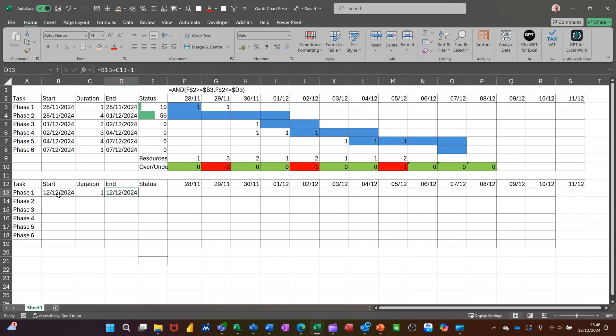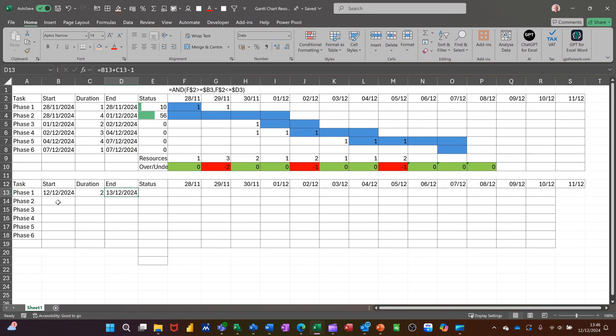So it's one day. Starts in the 12th. It finishes on the 12th. If I put two days, it starts on the 12th. It finishes on the 13th. If you didn't do that, that would just say the 14th. Just add in two onto that. But we're actually starting at 8 o'clock in the morning. That's why that's like that.